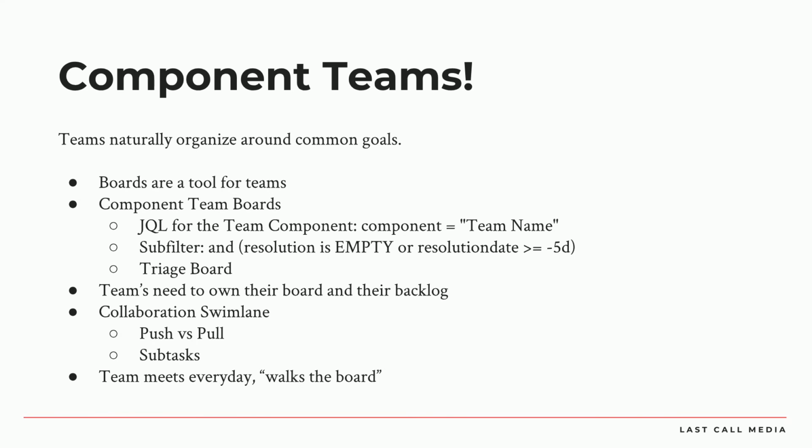But you want your boards to be relevant, and one of the things that helps the board be relevant every day is if the tasks are broken down really small, because that means the board's going to be a little bit different every day. If you're not breaking down your work enough and your issues are big and they take multiple days and the issue is just sitting in progress for days and days, then it's like, why are we meeting? This board's the same every day. So one of the things that can help the board gain relevancy every day is if the tasks are broken down small.